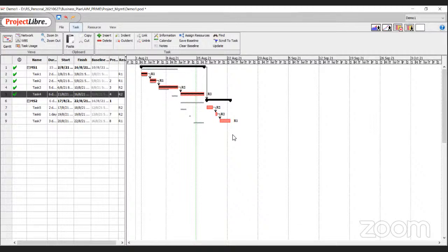And those are the activities where you automatically have some buffer. You have designated 15 days to complete this, but beyond the 15 days, you may have another 8 days before that activity touches the critical path, right? So if somebody has to say, okay, stop this for a while, but attend to that because that is on the critical path, these are the kind of decisions you'll be able to take. You know, this is important. Do this now. That can wait. This kind of decision making becomes very easy and very practical and very easy to implement by having the visibility of this kind of Gantt chart.